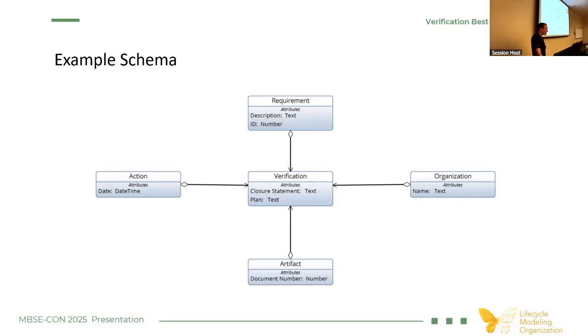Second is going to be what are your acceptance criteria? What does the test have to do? What are you looking for in a document? And where the case may be, you're needing to actually show that you meet the requirements. And then the third piece is going to be what are those notes, caveats, exceptions, or other things that may be associated with that requirement. In my case, it's how do you define what the customer is responsible for? How do you delineate responsibility? How do you add caveats to a requirement because the requirement is poorly written? So different things that you can do to document and articulate what actually is being verified.